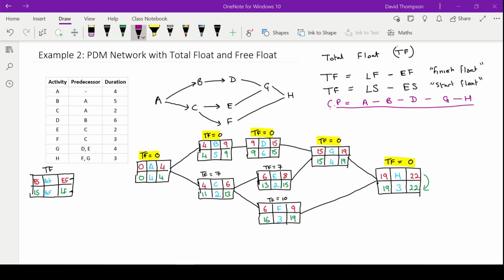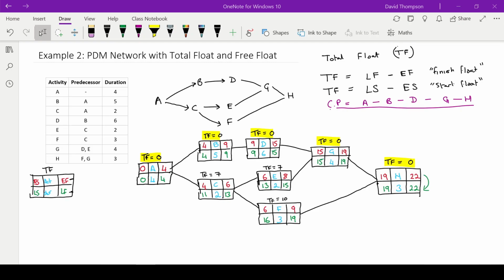That's not the case for the critical path. Anything on the critical path with a total float of 0, if it is delayed by a certain number, whatever that number is will be added on to the overall project. So identifying the critical path using this method is very useful, because it means project managers can identify the tasks they need to keep an eye on and make sure everything is running on time. You don't want any projects getting delayed too much, because it's going to cost a lot of money in the future. So here we have our final network diagram.